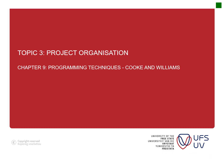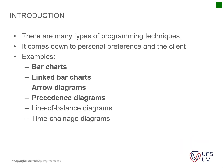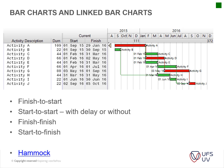In chapter 9, you've got different ways of presenting your schedule: bar charts, linked bar charts, arrow diagrams, precedence diagrams, line of balance diagrams, and time-chainage diagrams. What we're going to look at is linked bar charts — it's the easiest to convey the message to your client. Arrow diagrams are more the inner workings used by construction managers to create the critical path.